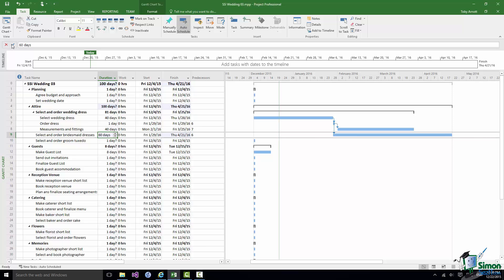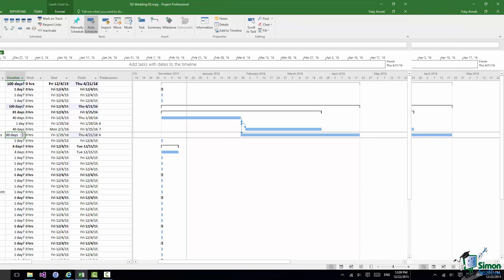You can also see there that that one task, Select Wedding Dress, has now a number of tasks dependent on it. And of course any task can not only have several tasks depending on it but it can depend on several tasks as well.